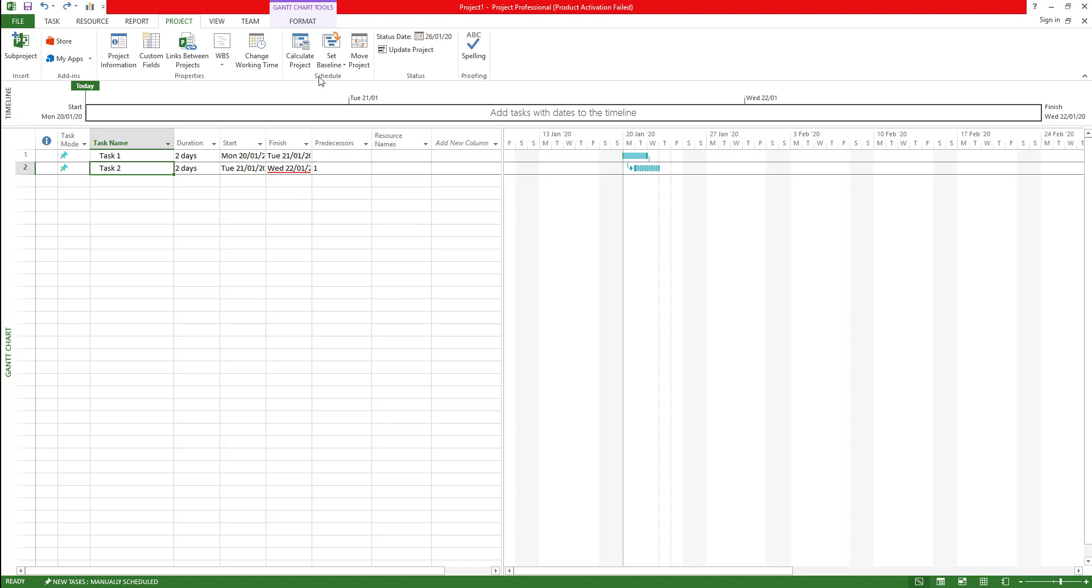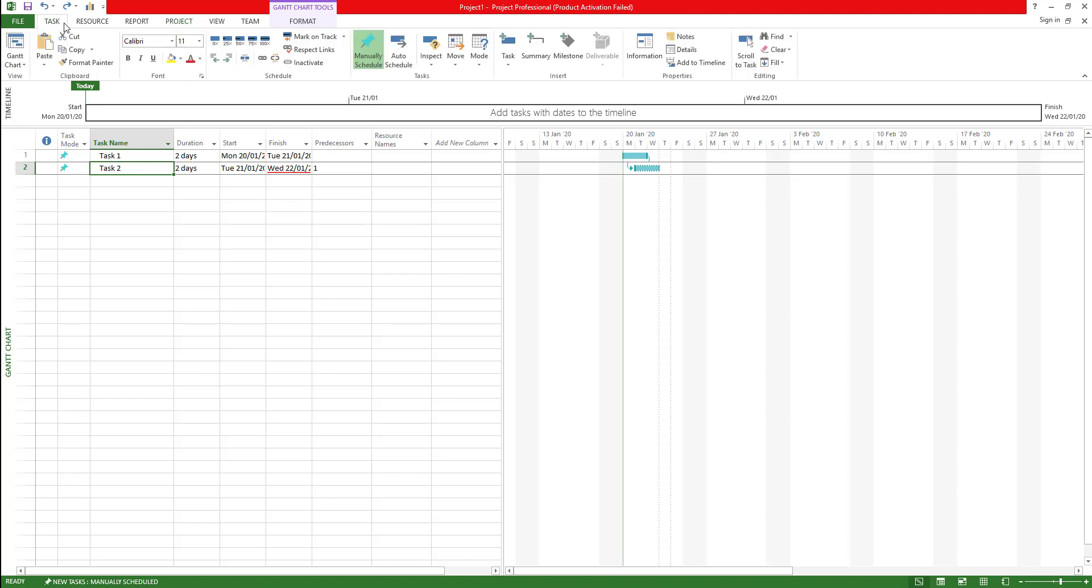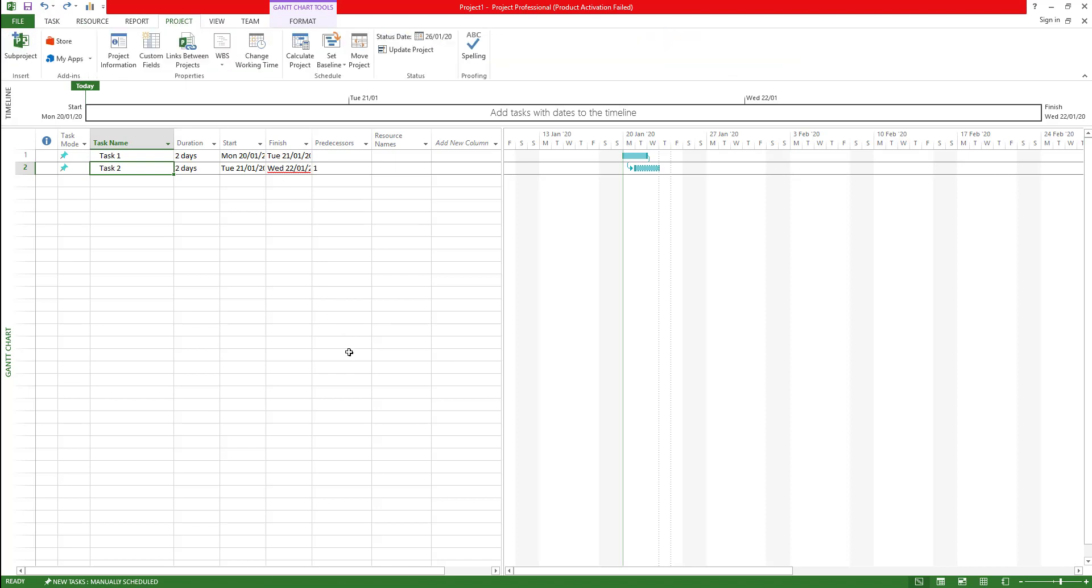To do that, the very first thing that we need is in your Microsoft Project, as soon as you get into the project, go to the project tab. Right now you'll be under task tab, go to project tab and there is something called WBS.